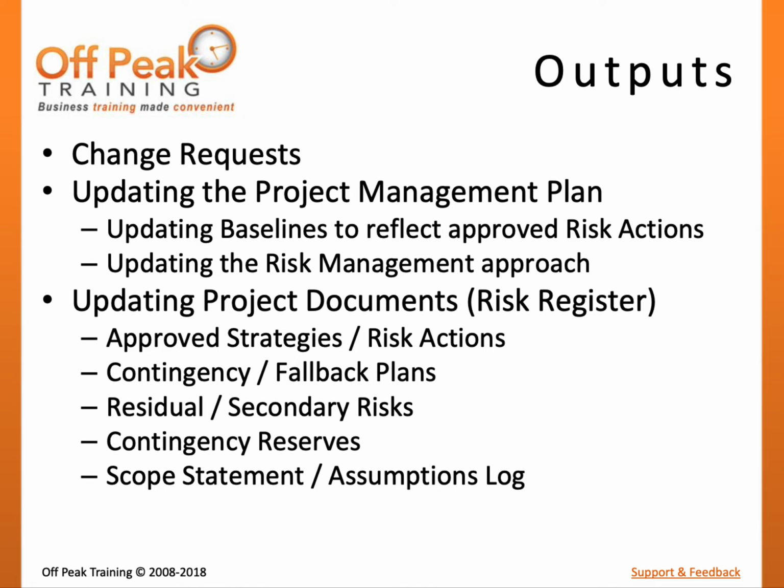Residual risks and secondary risks. A residual risk is any risk that is remaining after planned responses have been implemented. Residual risk is typical anytime the risk has been accepted. Residual risk will also exist in the case of mitigation, though to a lesser extent. A secondary risk is a term given to a newly discovered risk that is the result of a response to a different risk.